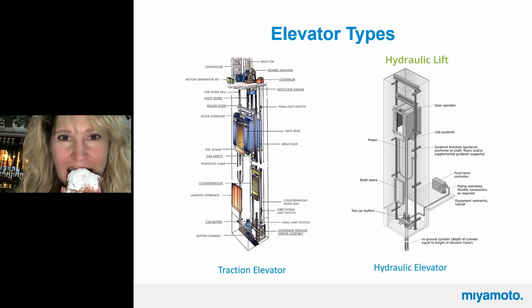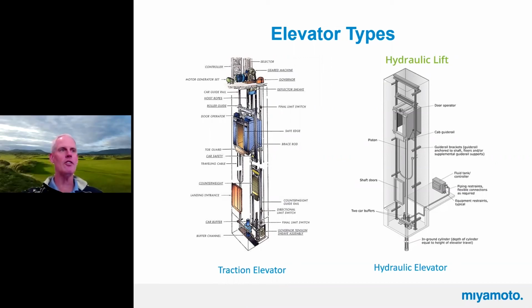Sorry, we've done 4 elevators in the last year, and thinking about it, every single one of them required field adjustment because they don't pick the elevator until it goes on sale the week before they want to put it in. It's kind of like hospital equipment, it's very frustrating. Either the door's not wide enough, or that column's not where we want it, or something got in the way. It's not something that we've done, but you just kind of have to expect the brain damage is going to happen. Yeah, there seems to be a lot of sensitivity around these systems.